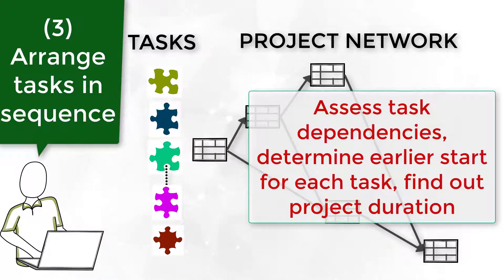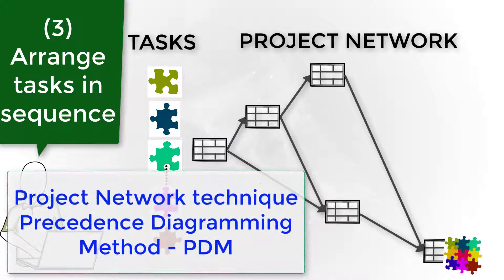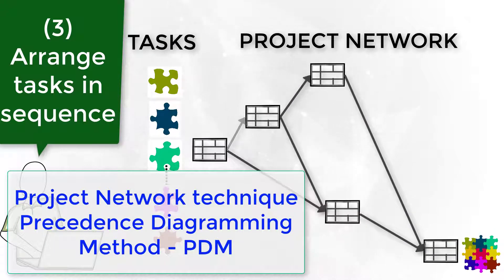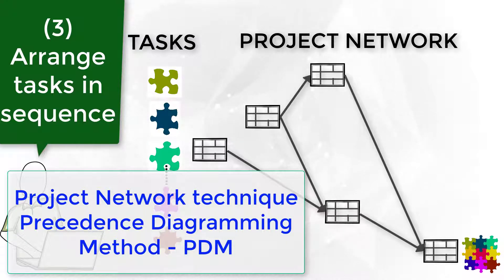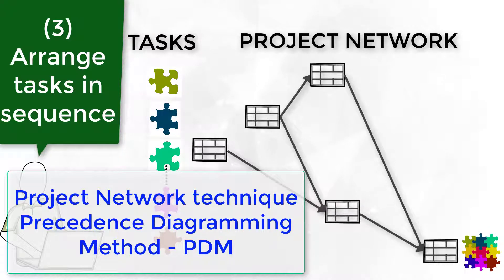After that, it is time to determine the possible start date for each task. This can be done by computing times on the project network. The project network technique is called the Precedence Diagramming Method. The PDM allows us to define the starting and finishing times for each activity, the total project duration, and the critical path. The critical path is the shortest period in which the project can be completed.